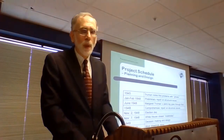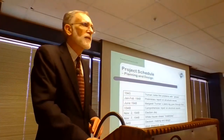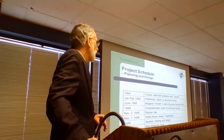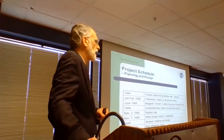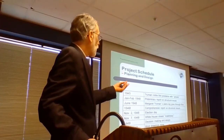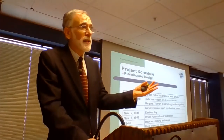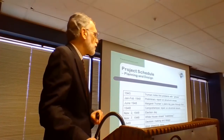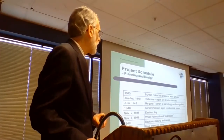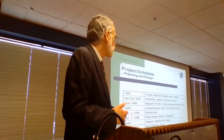So a quick recap on what the schedule looked like. 1945, Truman finds out about the problems in the White House. There's a couple preliminary reports in the early part of 1948. Margaret's piano goes through the floor in June. There's a more comprehensive report in June. Election Day, the White House closes shortly after Election Day. And then 1949 is decision-making and design, and most drawings were done by September 1949.